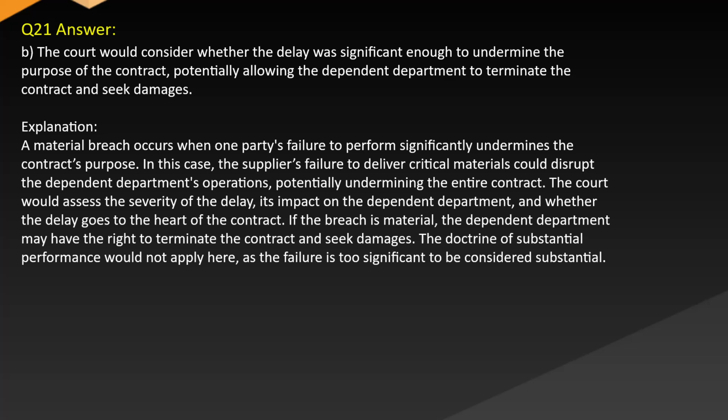If the breach is material, the dependent department may have the right to terminate the contract and seek damages. The doctrine of substantial performance would not apply here, as the failure is too significant to be considered substantial.